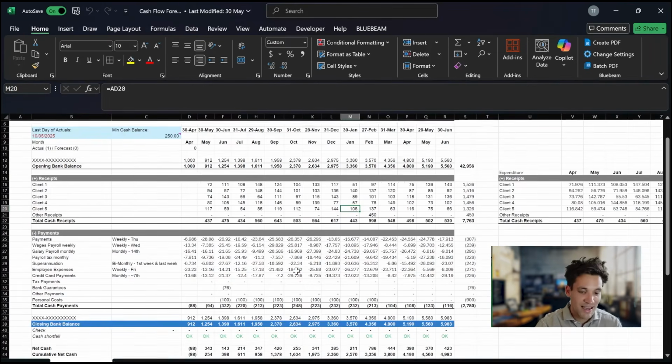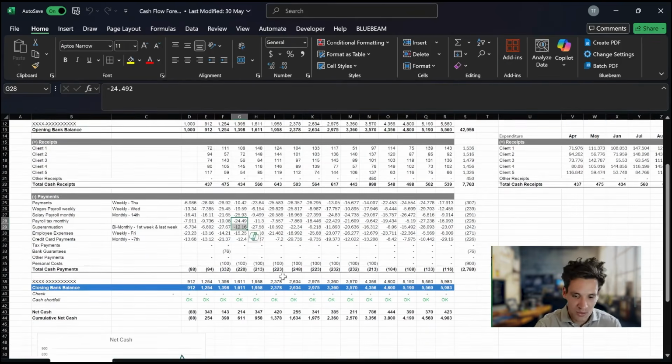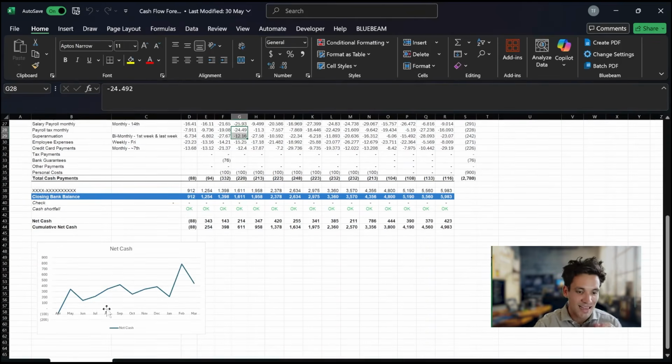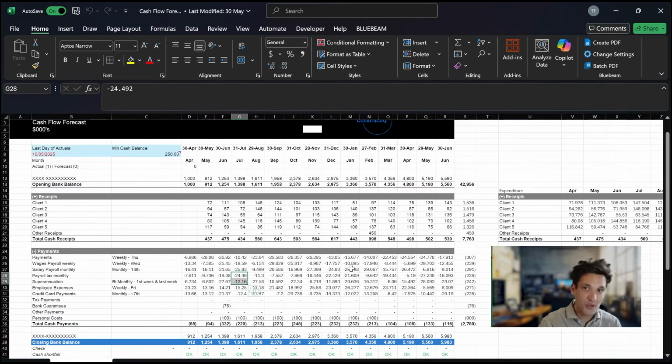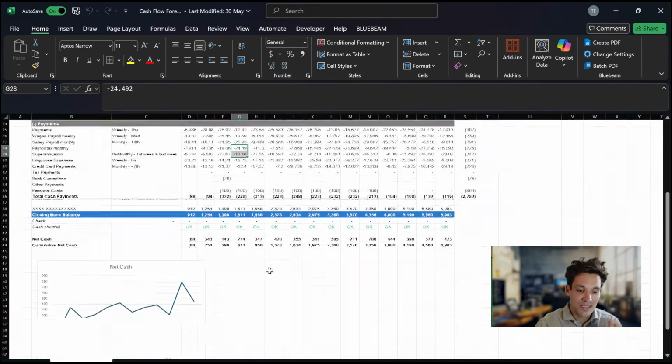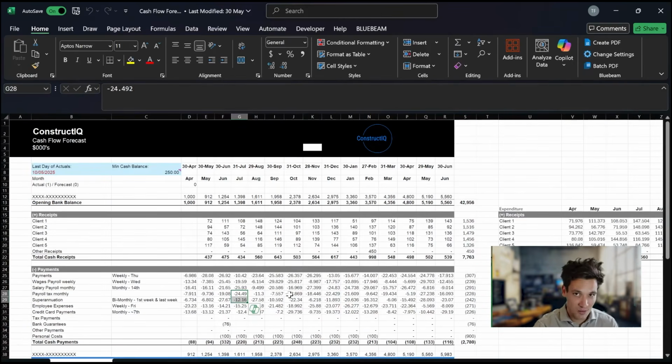But this one is an example of a cash flow forecast. What this lets me do is put in my bank balance, my payments, my revenue from my clients, my anticipated payments, and when I'm going to be incurring these bills, maps these together, and it helps me map out my cash flow. So based on different payment terms, bank guarantees, retention, pre-purchasing materials, or delayed payments, I can forecast out my cash balance, because I can see how much cash I need to run my projects.